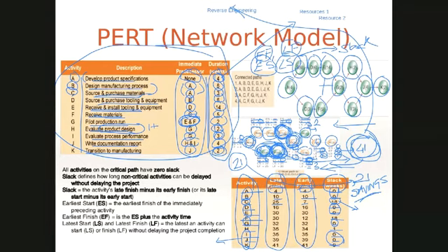So this set of pieces that defines the ones that don't have any resource slack are oftentimes the pieces in something called the critical path, right? All activities on the critical path will have 0 slack, and slack defines how long non-critical activities can be delayed without delaying the project.